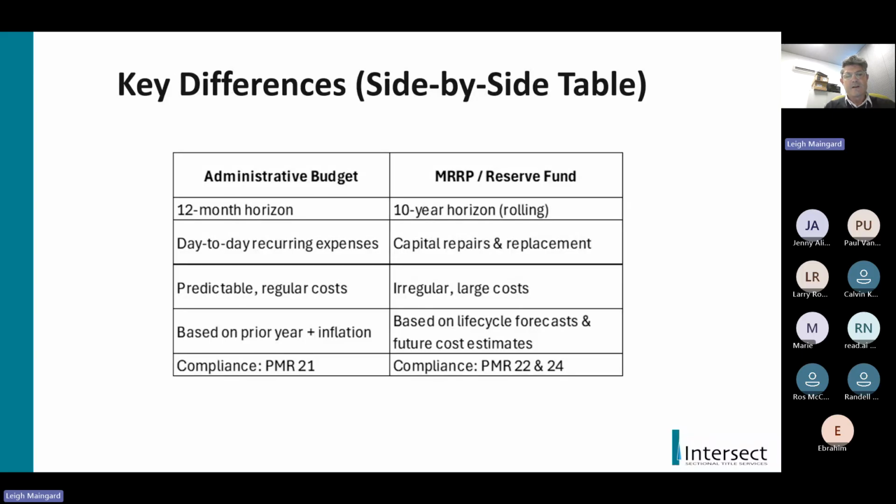And interesting enough is that there's also different ways of how schemes budget for those kind of items. Some might consider that they need to replace a lift in 15 years' time, and because it doesn't fall into the 10-year plan, it's not included until the 10-year plan rolls over and it reaches year 15, which then effectively becomes year 10, and they then start planning for that. While other schemes, sometimes they start putting money away now already, even though the lift might only be replaced in 15 years' time. And which is not a bad thing to do, considering inflation.